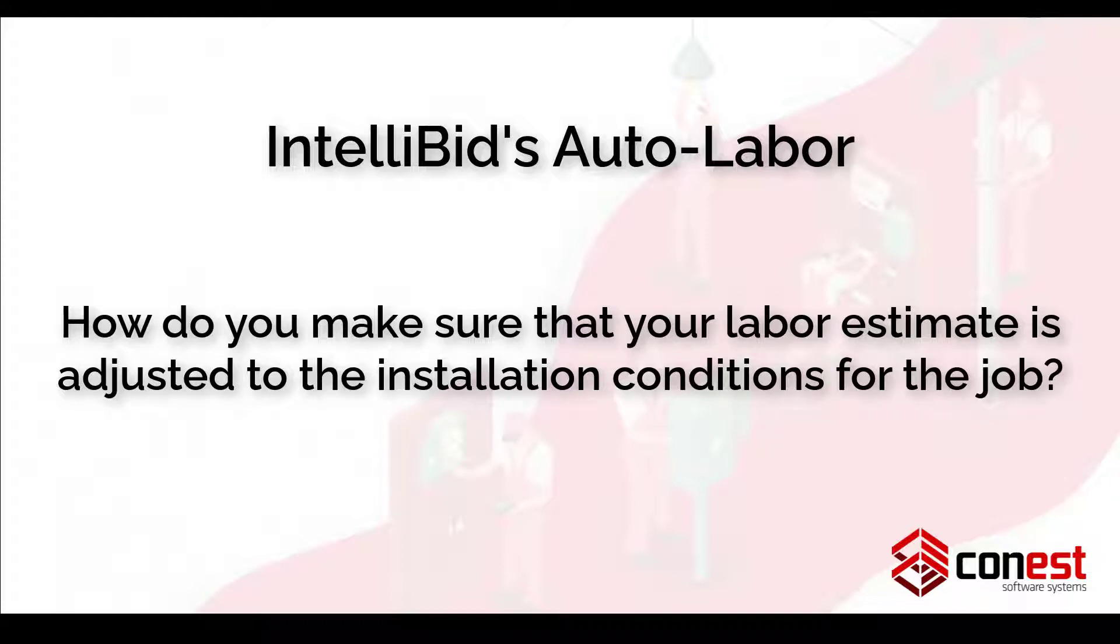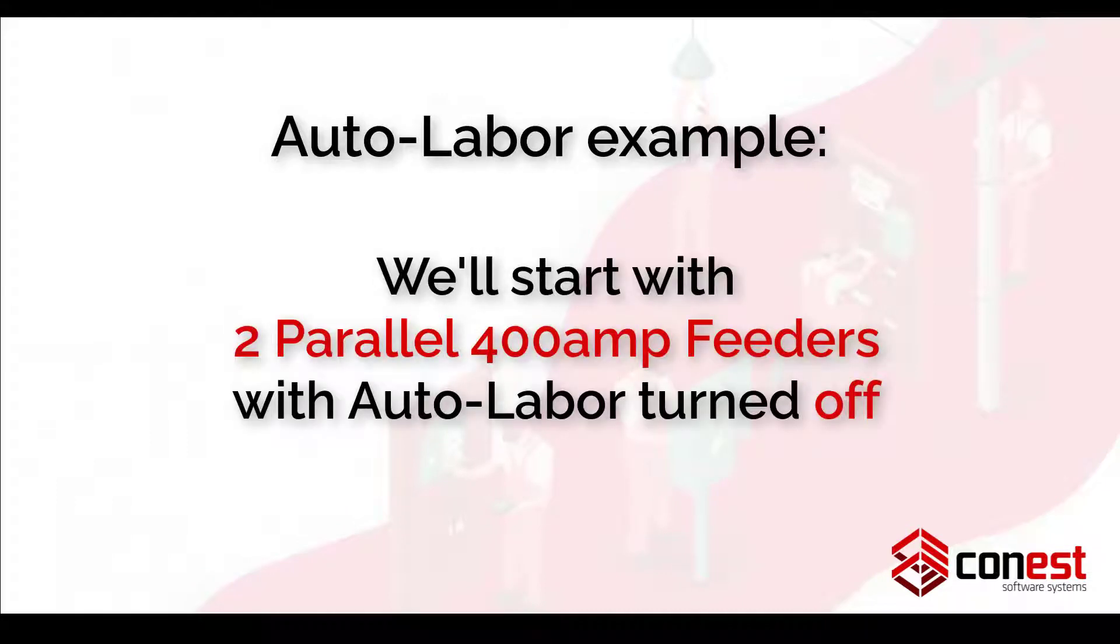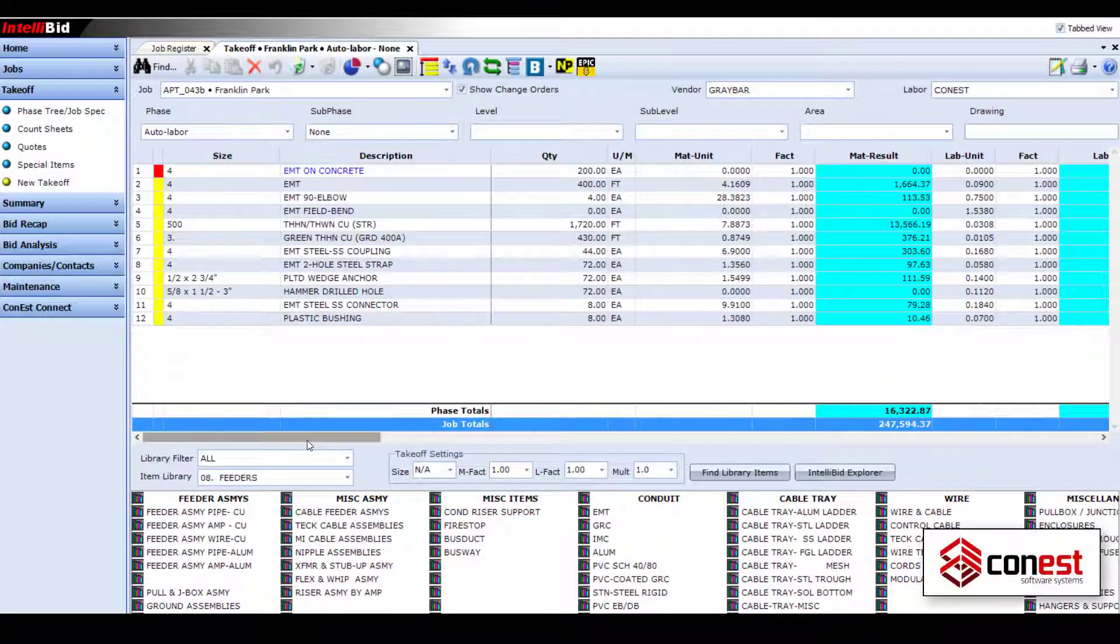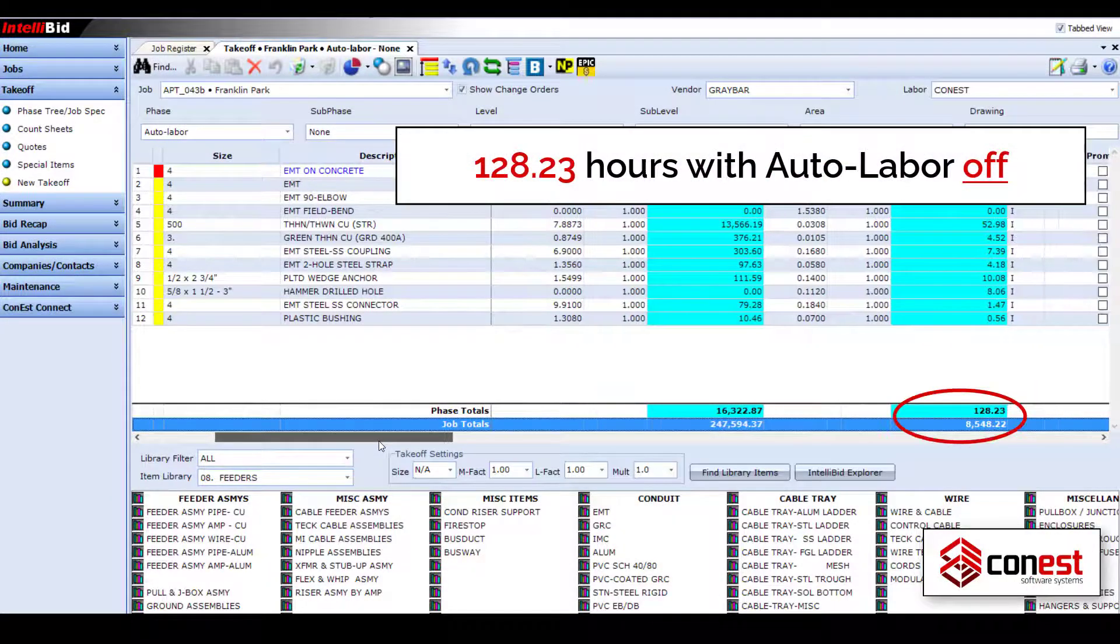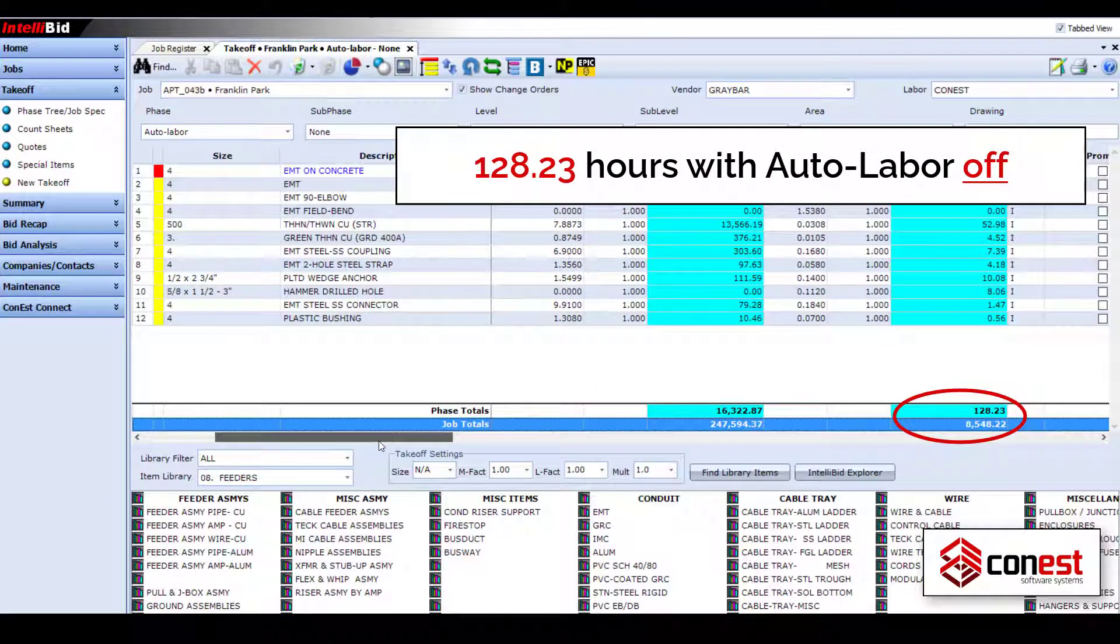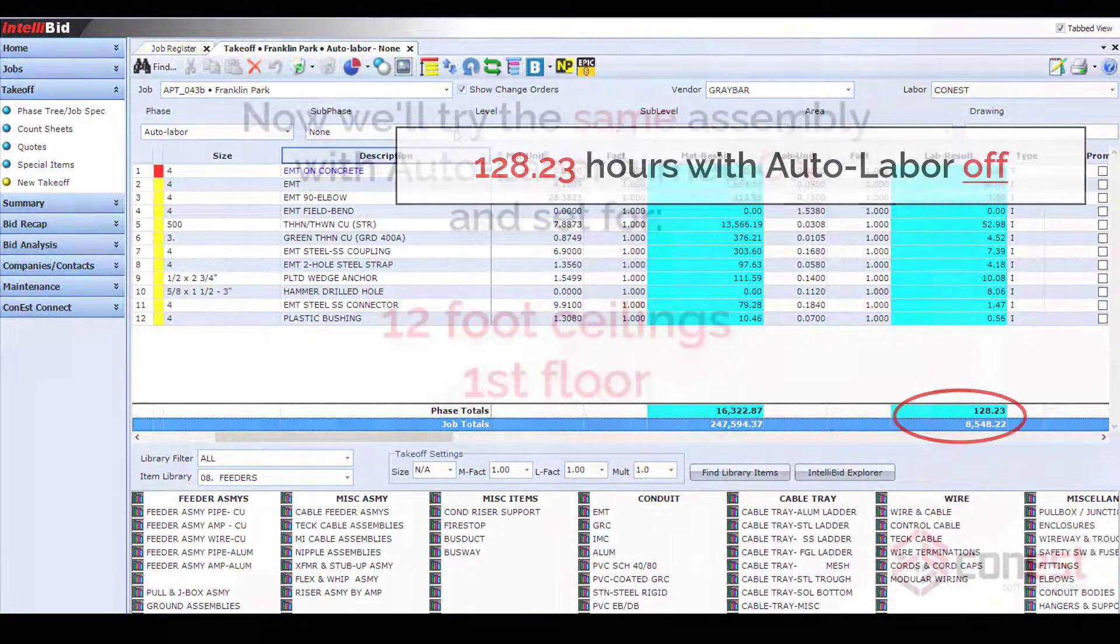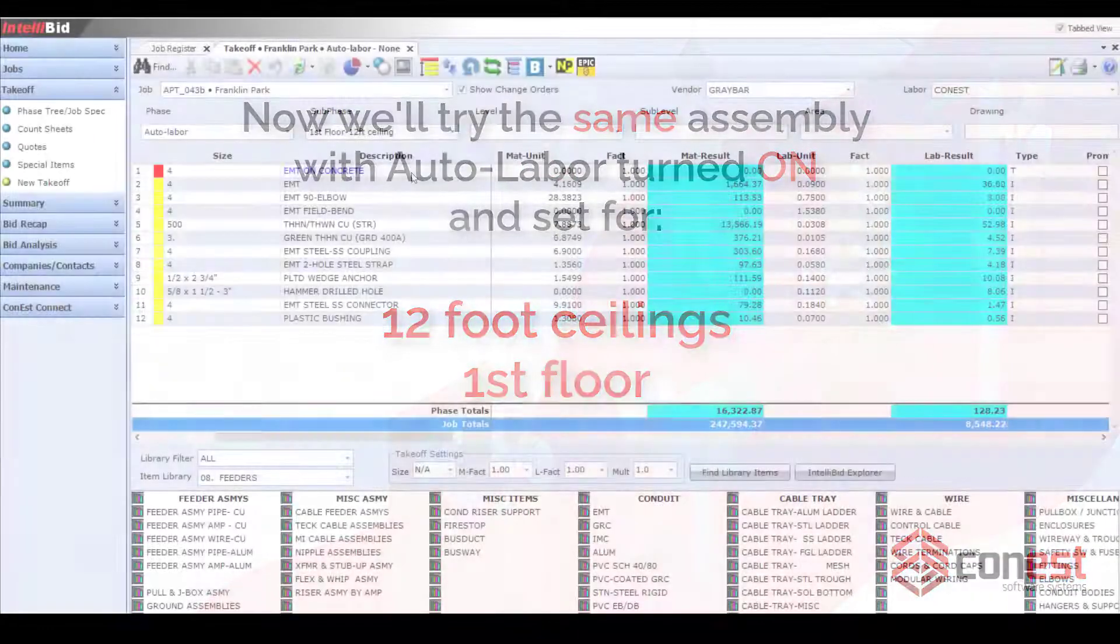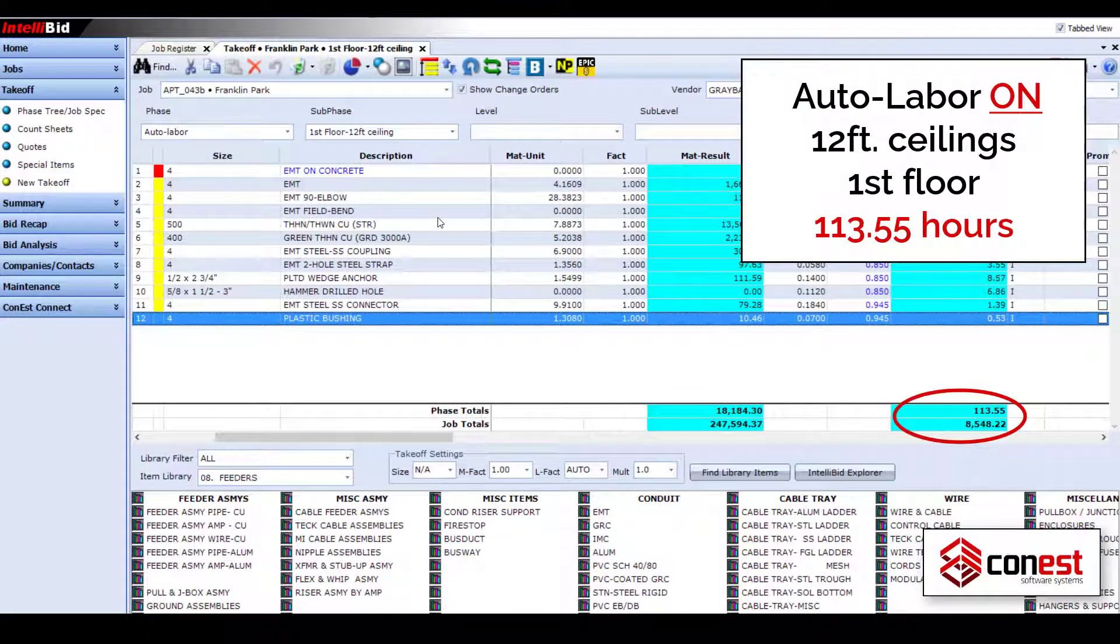IntelliBid's Auto Labor Feature does the work for you. A powerful standard feature of IntelliBid, Auto Labor helps you win more bids by automatically factoring in the installation conditions that will impact how long it's really going to take to get the job done. It asks the right questions and does the calculations for you, making it easy to get the labor estimate right.